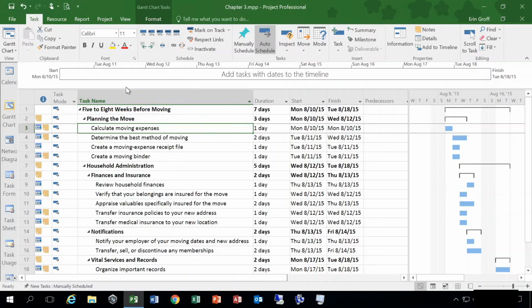And then our next column, we have our task name. This is a brief description of the work. Short action-oriented task names are best. For example, design logo. So you can see very short descriptions of what that task is going to be doing. Then you have the duration field. This is how long the task will take. By default, Microsoft Project uses days as the unit of time for durations. But if you want, you can specify minutes, hours, weeks, or months as the unit of time as well. So you could just type that in directly into the cell to enter the duration.